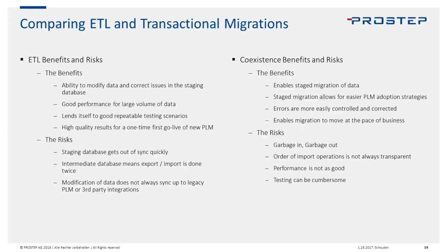It's also typically got better performance than transactional. It's good for migration rehearsals, and it has really high quality results for a first go-live for a new PLM, meaning that I need an initial load. This is a pretty good way to do that.